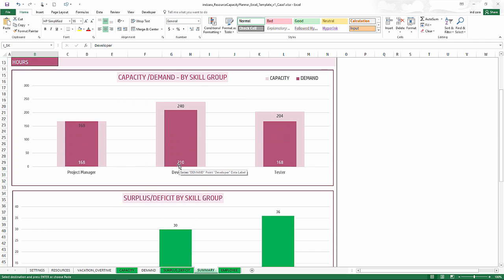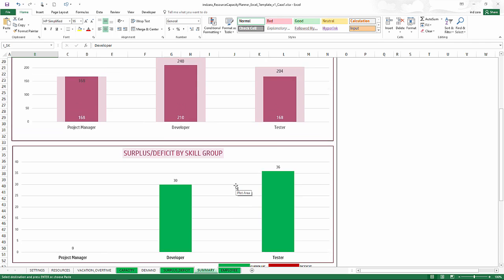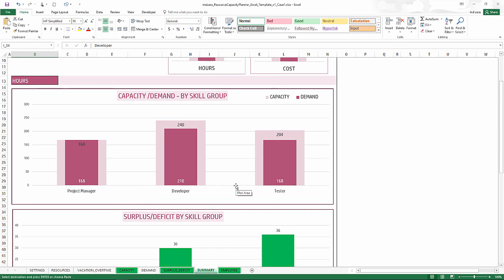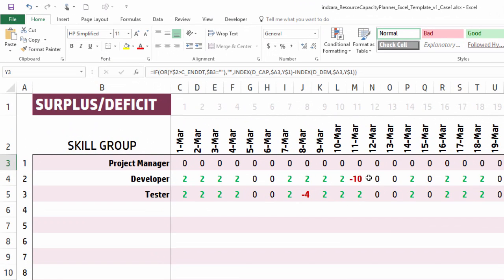At the monthly level we don't have any deficits, so by end of month you should be able to meet all demand with some surplus in two skill groups. However, if your organization needs to meet demand every single workday, we need to go to the surplus/deficit sheet for the daily breakdown. There are a couple of negative values — negative values indicate a capacity deficit. For example, on March 11th you need 10 hours of developer time but don't have it, resulting in negative 10.